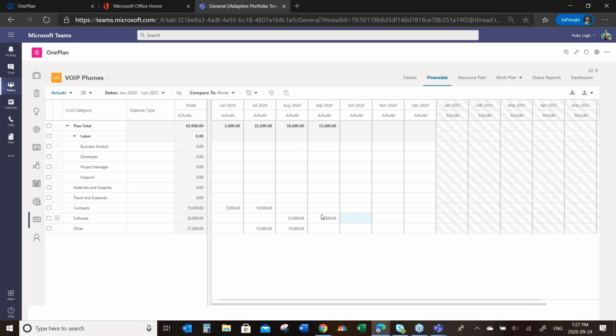For capturing actuals, there really are three scenarios. One, you could do what I just did. You can enter in that data manually. The invoice is here on your desk, and you want to be able to track it. Number two, the resource data, you'll notice none of that's been entered yet, we can pull that from the timesheet system that we have here, or from task updates, or potentially from actuals that were captured in Microsoft Project or elsewhere, and we roll those through, and with a rate in the background attached to that role or to that resource, it can funnel to here as an actual.